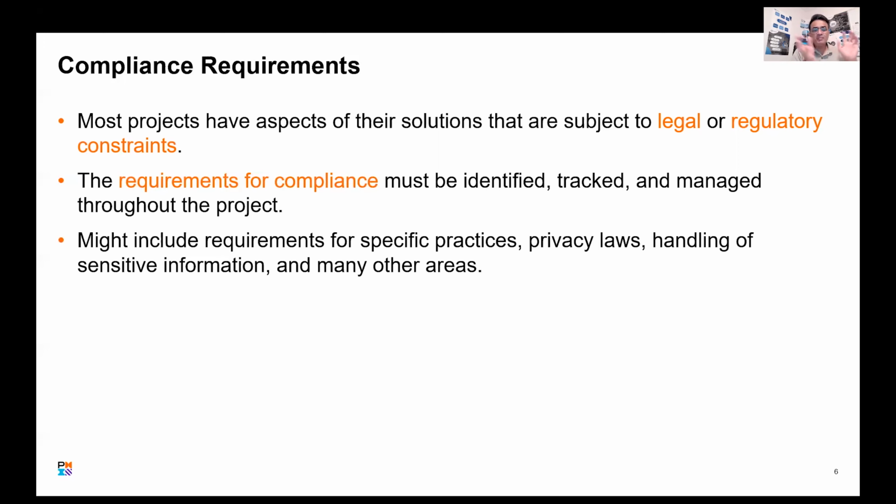Why do you comply? Give me an example of a project that you're doing. It's a powder plant project, and it's gonna be really costly if we do not comply. For example, the wastewater, if the council gives us a limit, and then if we breach that, it's gonna be a big fine. Absolutely, that's a fine. So the compliance, if you look at the first sentence, says most projects have aspects of the solution that are subject to legal or regulatory constraints. That's what the compliance is, you have to comply to the regulatory constraint.